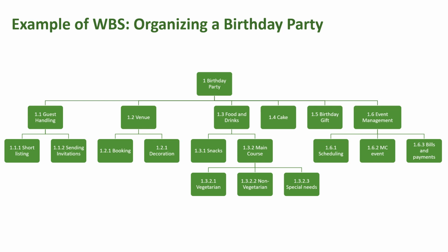A birthday party may require guest handling, venue, foods and drinks, cake, birthday gift, and event management as the first level of deliverable, whereas they can be further subdivided as per the need of detailing in each activity. Let's take a look at guest handling, where it is further divided into shortlisting of the guests and sending invitations to the guests.